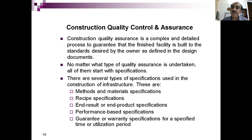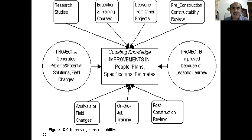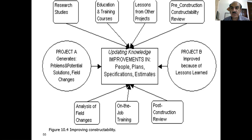Warranty and guarantee specifications are provided by manufacturers and suppliers, normally for a period of one year. Within that period, if there is any quality problem, the product is either repaired or replaced by the supplier. To improve construction quality, we can consider pre-construction constructability — whether the design can be applied at the site — lessons from other projects, education and training of staff, research studies on problems and potential solutions, and field changes through on-job training.